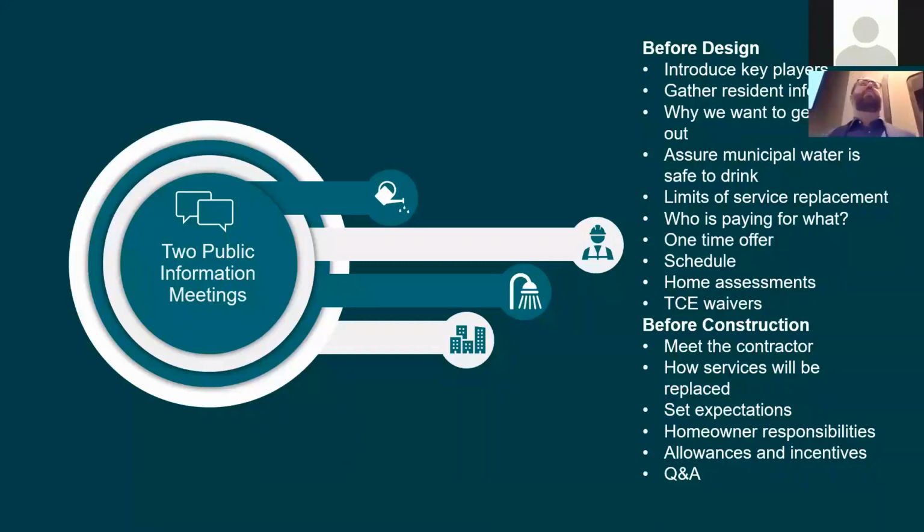It's also a good idea to talk about home assessments and how those will be handled, as well as temporary construction easements. And then if you can get another meeting in before the construction starts with the contractor that's been selected for the work, that's another great opportunity to have your residents meet the contractor that's going to be working inside their homes, talk to them about the scope of work and what the process is going to be for replacement and what the expectations are for the project, and then answer any questions that the residents are likely to have.